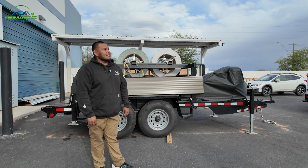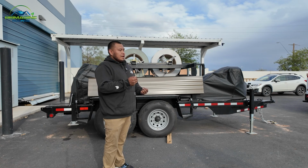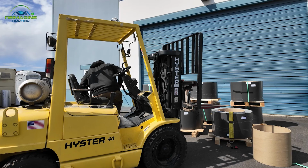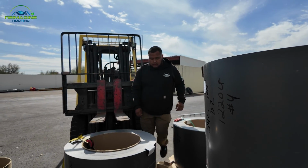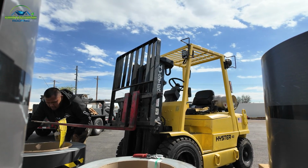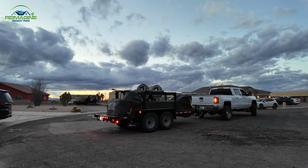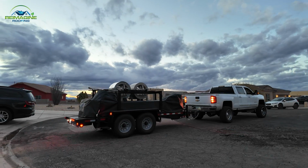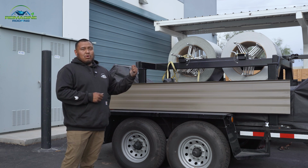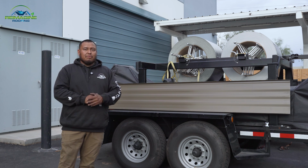It impacts project timelines a lot. Like I just said, we don't have to wait on a fabricator's timeline or lead times for when they can come out. We can have our machine ready to go anytime we want. As long as we're scheduling it right, we can get it to a job site almost instantly with the material on it to roll panels so we can get them going. It doesn't matter if we have to go down there and come back. They will always have material there for us to come back here, put more coils on it, and send it out again until we can get them all situated. That's a really good benefit we have.